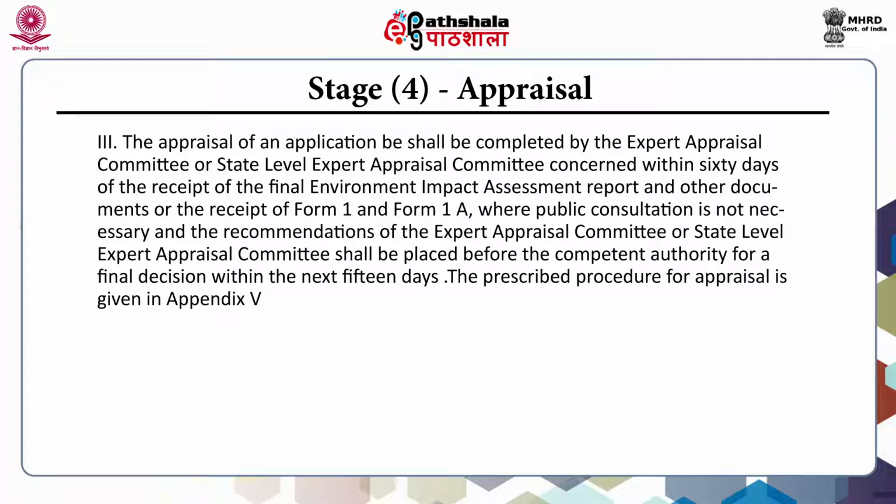The recommendations of the expert appraisal committee or state level expert appraisal committee shall be placed before the competent authority for a final decision within the next 15 days. The prescribed procedure for appraisal is given in Appendix 5 of the said notification.